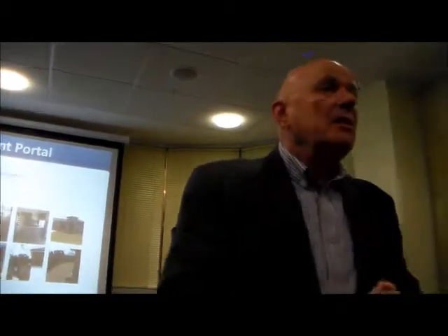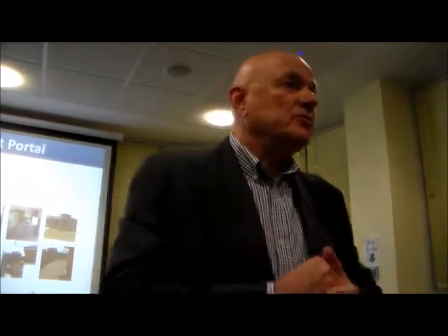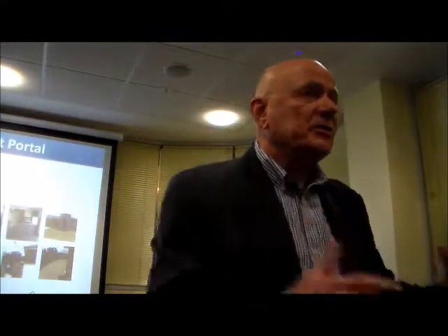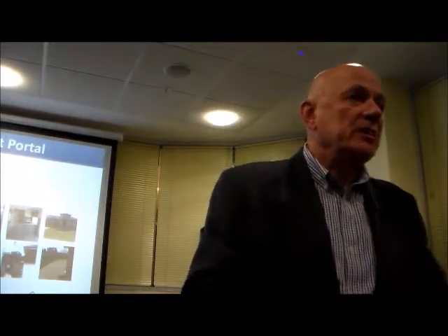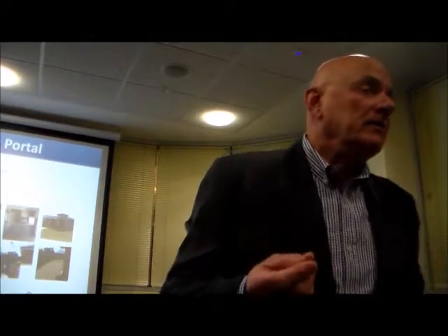At that stage, that's nowhere near complete yet, because the council have their own processes, and on average, I would say, across metropolitan Melbourne, the average journey for a planning permit is between 5 and 9 months. From the time the application has been put in, we can say 3 to 4 months, because it'll go through their processes, go through their departments and different offices, they'll talk about it, and at that stage they'll come back and write us a letter. It's called an RFI, a request for further information, and it always arrives. Even if you know you've got it all right, you will still get that letter asking you to change something.